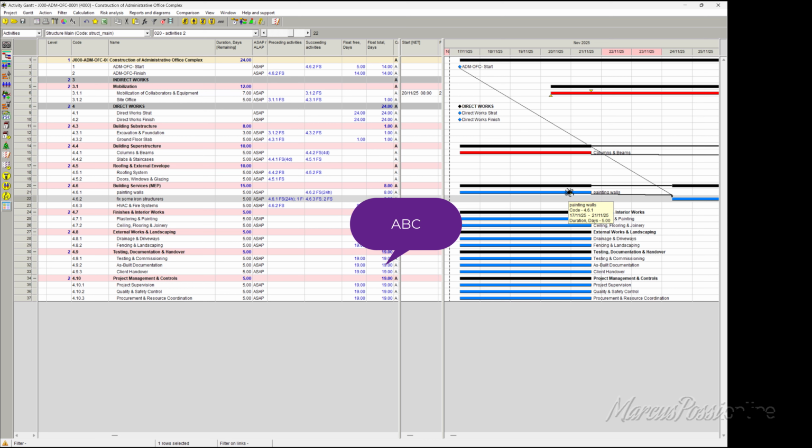Imagine if your activities work every hour a day and every day in a week, or if you have a specific calendar for your activity, but you have to wait a lag in another specific calendar. Imagine I have a lag of 3 days from one activity to another. This lag means some public department work to be done outside. So this lag means 3 days of their work.